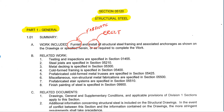There's a lot of other work that needs to be coordinated with the steel, which you can see down here under related work. Many of these items are also in division five. Typical ones you'll see on most jobs are things like miscellaneous metal and steel. Most steel jobs have metal decking. They do not all have structural steel joists or cold form framing, and typically that's not structural.